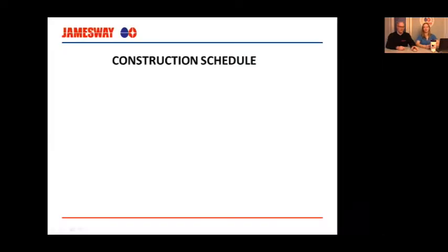So first of all, let's talk about the construction schedule. If we're thinking about machines being taken out of an existing room and the room being repaired and new machines being put in, if there is a new expansion onto an existing building, or if there is a brand new facility being built, something that is helpful to Jamesway is that we can have a copy of the construction schedule.